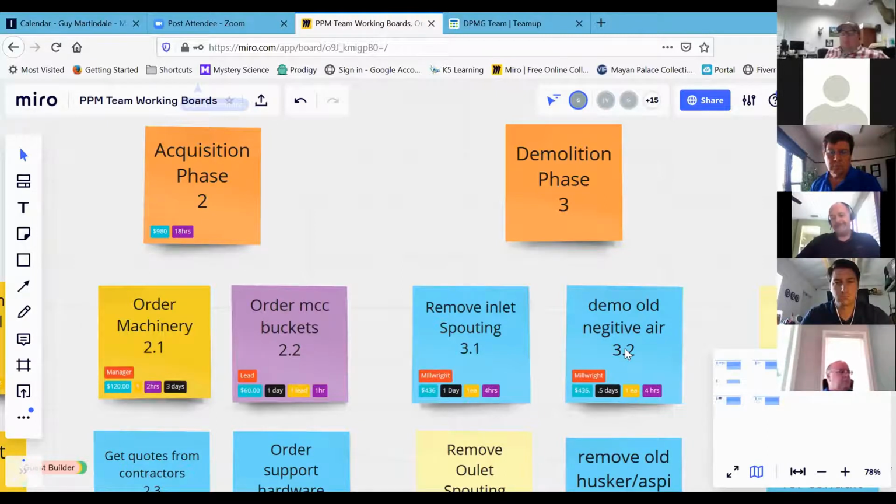Good. Prior to this, I think we would have just gone ahead and removed it and not asked anybody. Yep. It's also a great team building system that we're doing here together. And what I recommend too is, especially when you're working in Miro here or working with live Post-it notes in a room, don't ever delete anything or scrap anything. What you can do in Miro here is just highlight a square shape around it and put out of scope or does not apply, and put it off to the side. That way you know what you're excluding and why you did it. If you get rid of it, you won't know if you review it later. If something comes up and you need it, it's already there created for you.